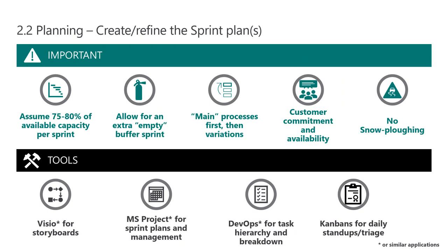Where you can create contingency, and we'd recommend you do create a contingency, is if you think you can deliver this in 6 sprints, add a sprint number 7, which is empty. It has no committed backlog allocated to it. There's nothing in it. You use that sprint to absorb any things that go wrong during the first 6 sprints, right? It allows you therefore to then honor the dates that follow the completion of the solution.